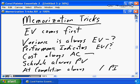So what are the somethings? If you're doing a cost variance, or if you're doing a cost performance indicator, it's AC. So cost is always AC, schedule is always PV. So if you remember that, earned value comes first, variance is always EV minus, performance indicators is always EV over, and it's EV minus AC if it's a cost variance, it's EV over AC if it's a cost performance indicator.